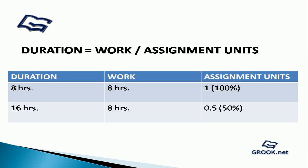Let us say a task requires 8 hours of total work. If a resource works on it for 8 hours — that is at 100 units — then the duration for the task is calculated as 8 hours or 1 day. If the same resource works on it only for 4 hours in a day, that is at 50% units, then the duration for this task is 16 hours or 2 days.